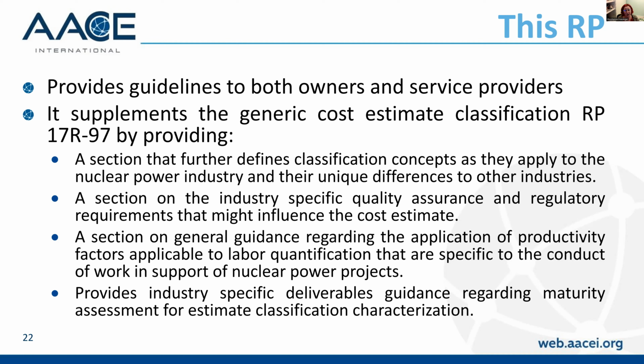Remember that classifying an estimate is really based primarily not on what the project manager or the owner has said they want the estimate classification to be. The estimate classification is based primarily and foremost on the level of definition and maturity of the project deliverables.